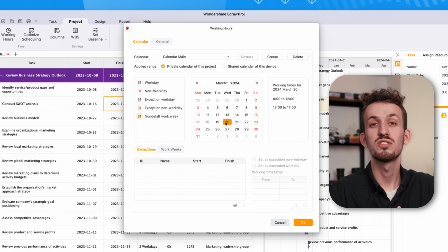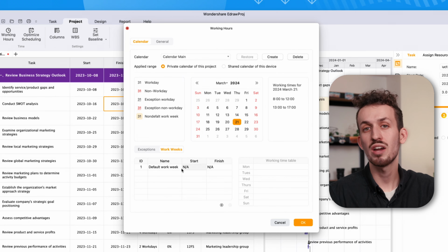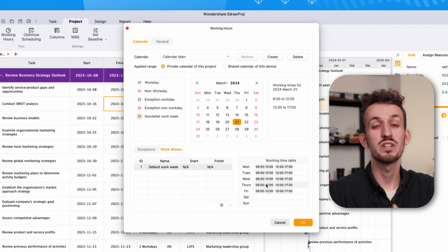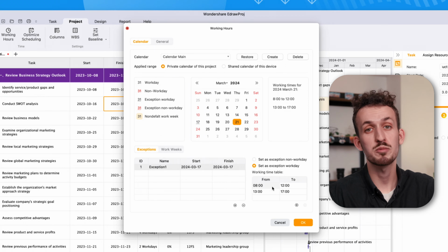and choose whatever suits you best. Then all you need to do is click on the date in the calendar and working hours will start appearing on the right side. You can edit those working hours for tight deadlines and consider overtime. Step 3. Now go to the left sidebar and see an exception workday, which project managers can edit by toggling the exception at the bottom.